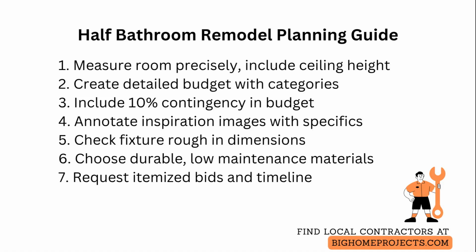Gather inspiration images and annotate them with specific details you like, such as sink style, toilet height, and tile patterns, so selections remain consistent. Check fixture rough in dimensions early so your chosen sink and toilet will fit the measured space. If you want to move plumbing, plan for additional labor and permit time.